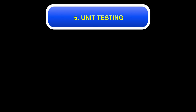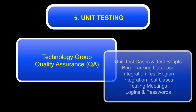Then we move into the fifth piece, which is unit testing. The unit test cases and test scripts will be created in a unit test plan, and the business group has to sign off on that. There's going to be a bug tracking database to keep track of bugs. An integration test region will be set up — the QA team is going to set up and verify connectivity between all required systems, internal and external. They'll make sure only one test region is set up for all integration testing, and begin setting up test cases for the integration test. During this period, the project manager will hold daily testing and bug report meetings.